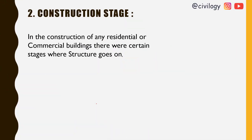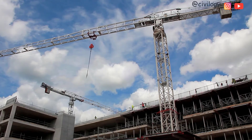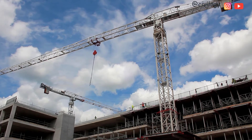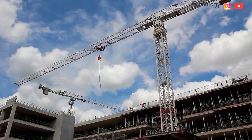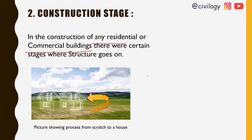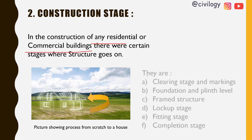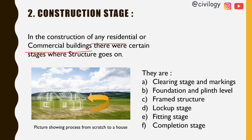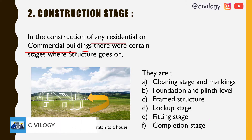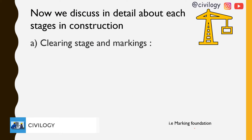Now let's discuss the construction stage. In the construction of any residential or commercial buildings, there are certain stages. In this picture you can see a building going from scratch through certain procedures to become a new house. The major steps involved are: clearing stage and marking stage, foundation and plinth level, framed structure, lockup stage, fitting stage, and completion stage.